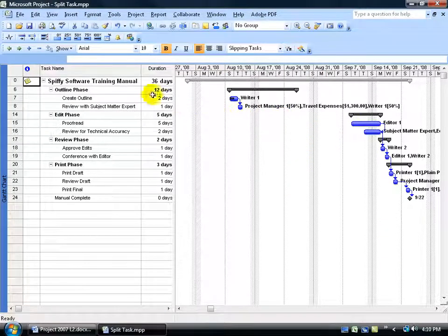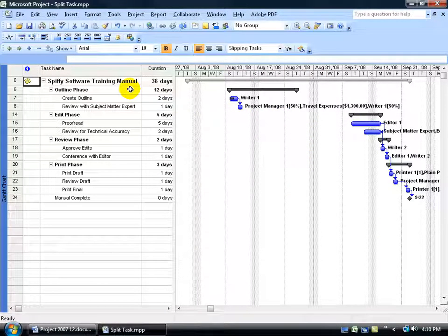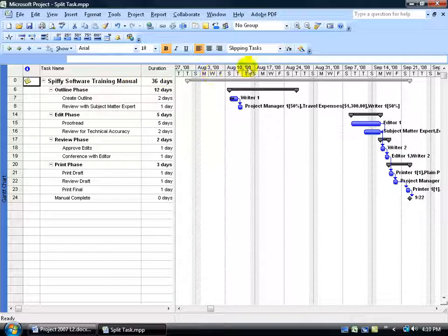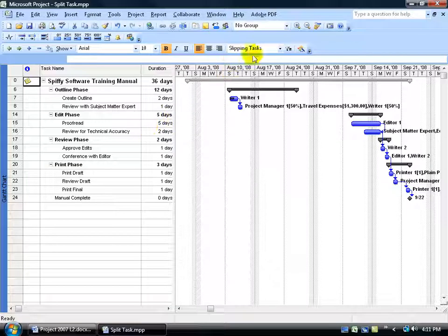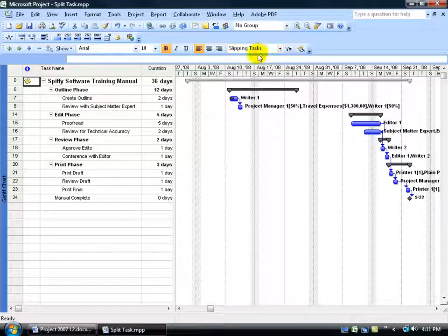And it only displays, temporarily, because I can change this back to All Tasks, all those tasks that are based upon the criteria slipping tasks. So these are all the tasks that have slipped.